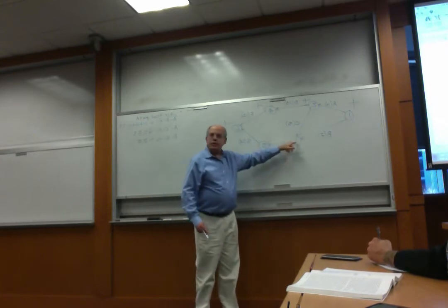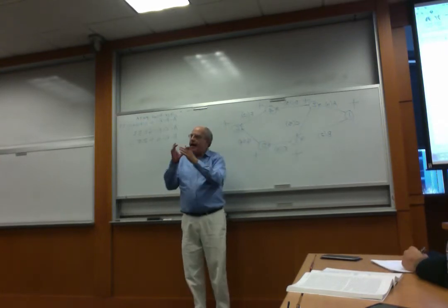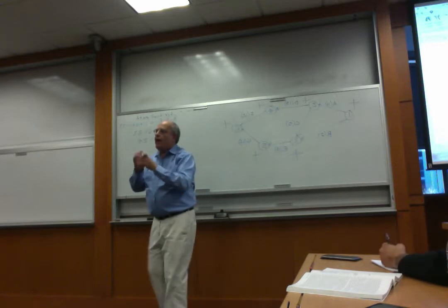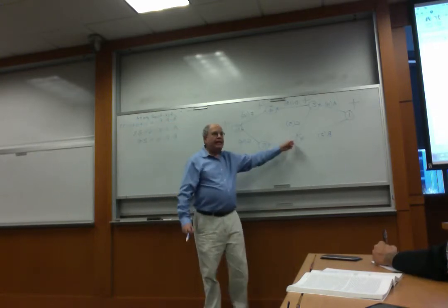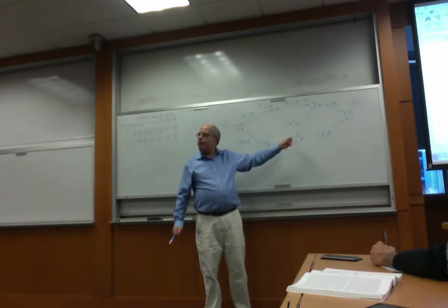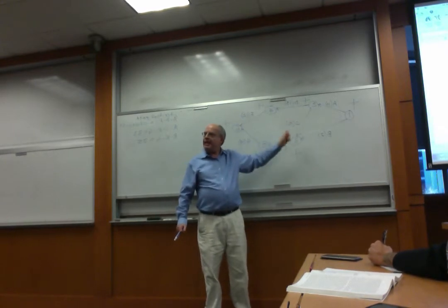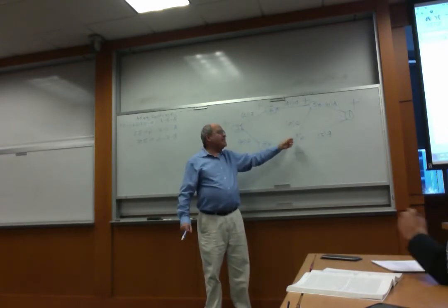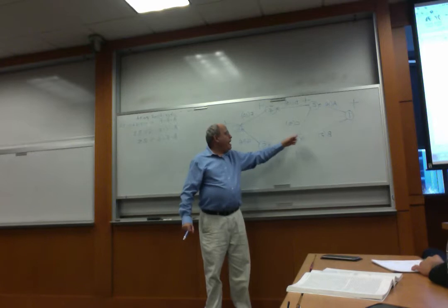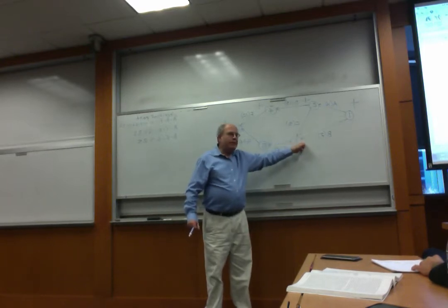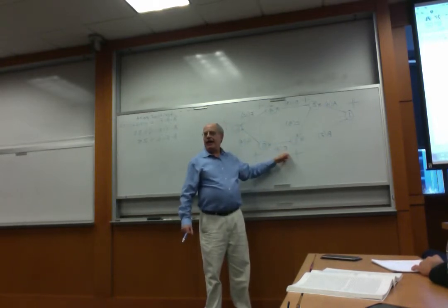But why do we need those circles? Those circles are points in time. So what is the interpretation of number 3? Number 3 is a point in time. We'll figure out how long from the beginning in a few minutes. But what is the interpretation? When both B and C are completed, we can start working on it. Please understand this.